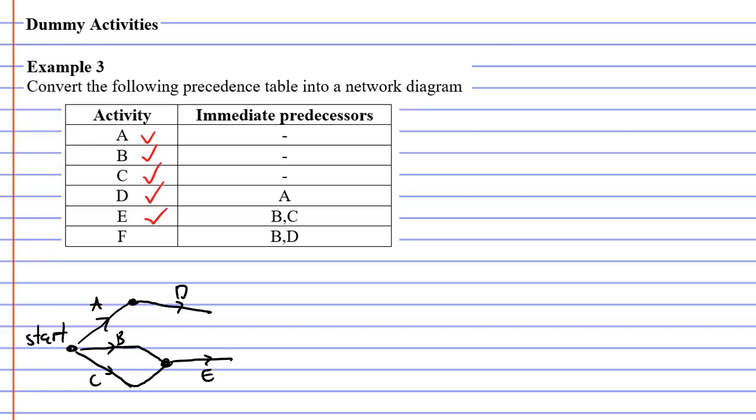Now moving on to activity F. Activity F comes after activities B and D. Now this is going to cause an issue because I need edge B to join at the end of edge D. It's not going to work because edge B has already joined to a vertex that has joined to the end of edge C.